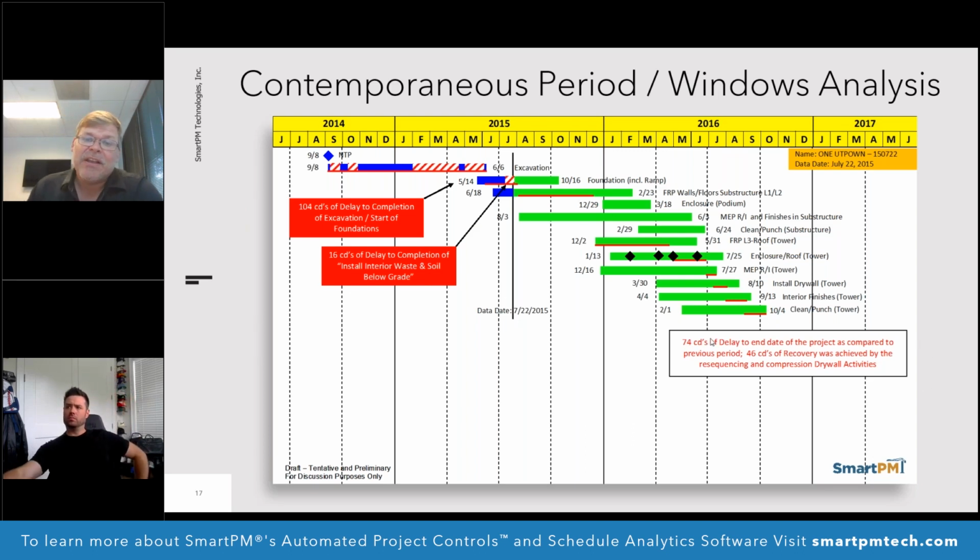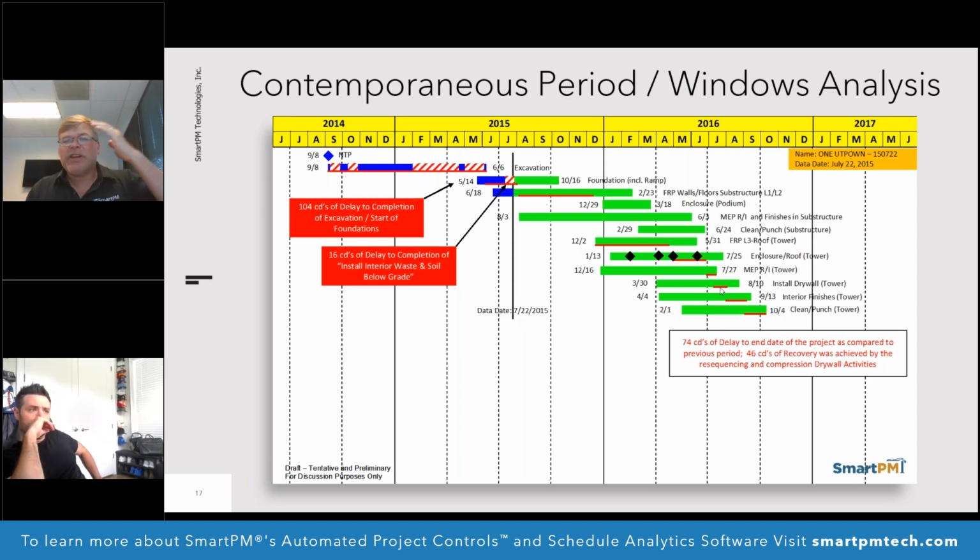You need to decide, if you're the contractor, you want to talk about the 120 days, and then you want to talk about what this compression means for the job. If we're going to get 45 days back, which is a month and a half, are we going to have to work weekends? Are we going to have to get more tradespeople here working longer hours? I don't know, but that needs to be factored into this.